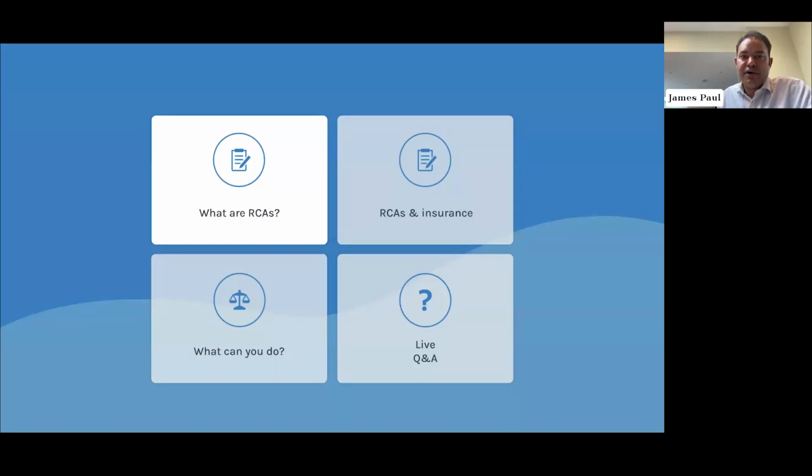So they have a much more vague and general understanding of what that place is like. And so factors like the topography, the land, the inside particularly, and any facade that isn't readily visible from a public road may not be as well understood as if they had gone there physically. And that's really why desktop RCAs are inferior to full physical ones.